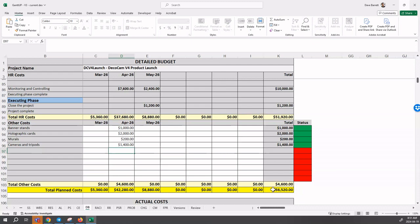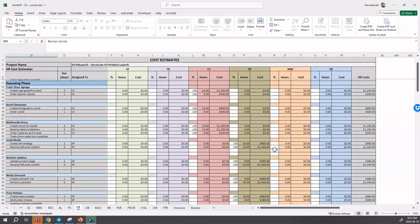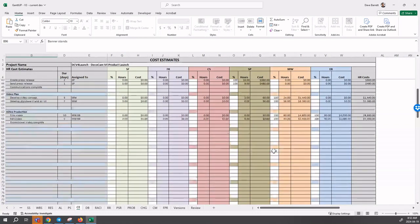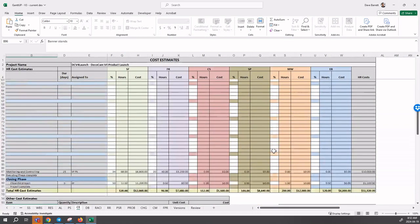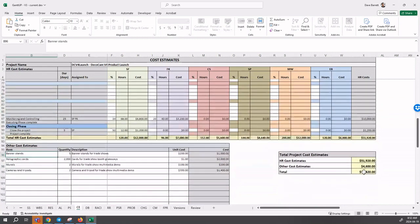That should, if everything has been done correctly and nothing's been missed, balance to the penny to the cost estimates. If we scroll down to the very bottom, we will see fifty-six thousand five hundred and twenty as being the total project cost estimates.